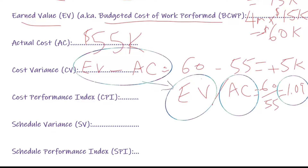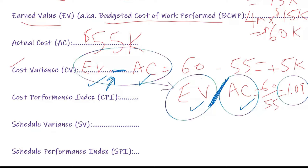Here's the key similarity to remember between cost variance and cost performance index: cost variance is a difference, so you subtract; cost performance index is a ratio, so you divide. Both use the same items — earned value and actual cost. The rule is: every time you hear 'variance,' subtract; every time you hear 'index,' divide.